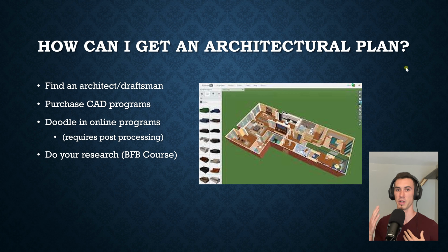And frequently, personally, I don't build houses with 100% set of plans. I want to build a house with an 80% solution set of plans. And then the last 20% of all the details and all the selections, everything, you're going to figure that out as you're building. You're going to change things. So it's kind of, in my opinion, a waste of time and money to get your first set of plans dialed out of the gate. You're just not going to be able to do it. So either you go with the 100% solution or the 80% solution.